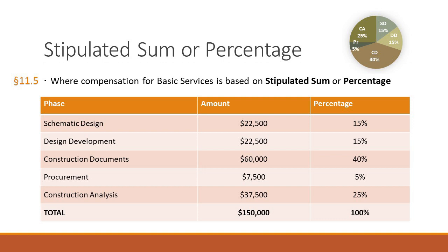And think about it also, if you remember way back when we were talking about Article 3, the schematic design phase, there was that process. I'm going to do these drawings, we're going to talk about it, and I'm going to provide them for you, you're going to look at them, and then you're going to approve that I've completed the schematic design phase. I'm not going to go to the next phase of design development until I get owner's approval in writing that you're good with my schematic design.